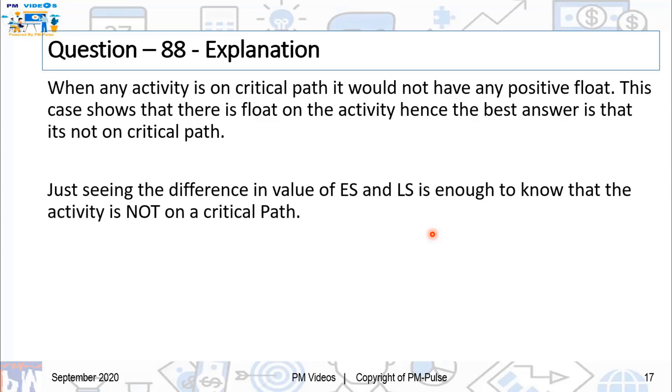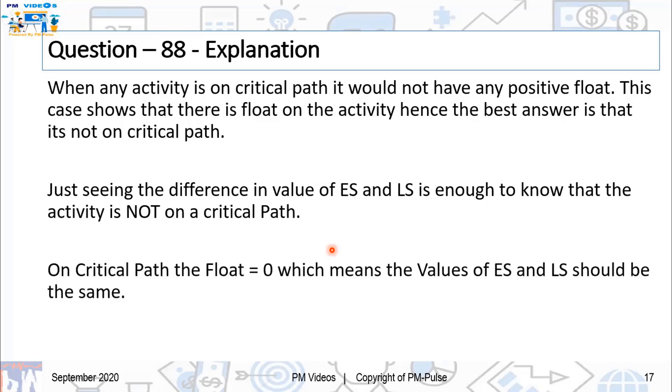Right. So you don't even have to calculate. Just seeing the difference in values of early start and late start is enough to know whether the activity is on the critical path or not on a critical path. All right.